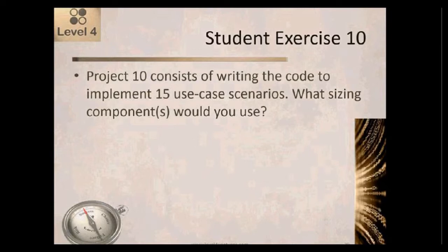And this one's in here exactly for that reason. This one's in here so that you remember to never make your life harder than it needs to be. Because the actual answer is to use 15 use cases. So if somebody gives you use cases, use the UML catalog and do the estimate in terms of use cases. This is a trick question.